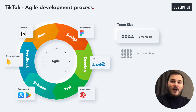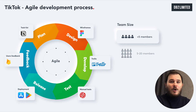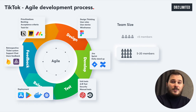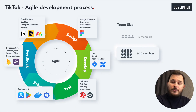Implementing more complex software or Scrum sessions in the early stages creates unnecessary bureaucracy while wasting 30% of your developers' time. For a big team building the product, once the project is gaining traction, you're attracting funding, and the team is growing, you need a more robust solution for agile management. At this stage you will face problems such as: current developers leaving the team, onboarding new developers becoming increasingly complex, no one knowing their responsibilities, productivity rates falling, a lack of synchronization between developers, and constant delivery and deadline issues.